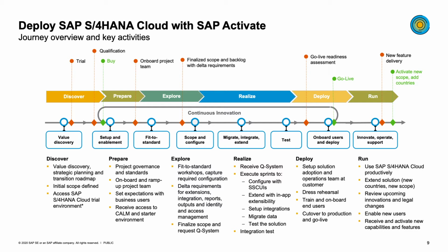In the discover phase, the objective is to determine the scope of the solution and deployment approach. So we are looking at various events and activities that happen during this phase. And it can be a trial of the S/4HANA Cloud that you can access on sap.com and try the solution before you acquire the license. Once the customer buys the subscription license, they are transitioning into the prepare phase, in which